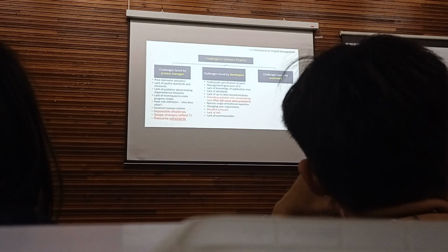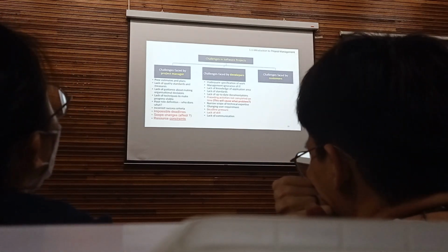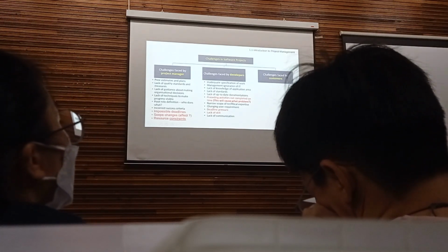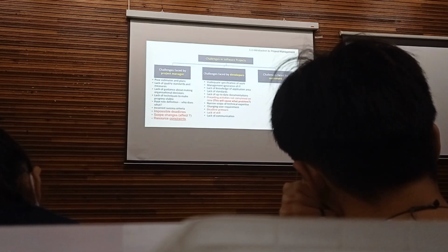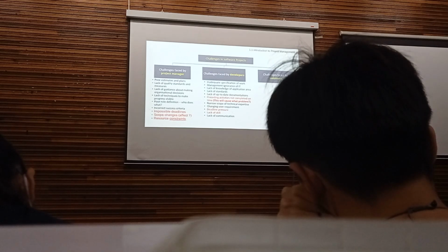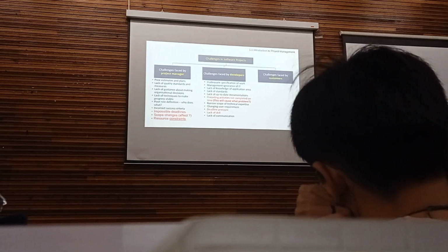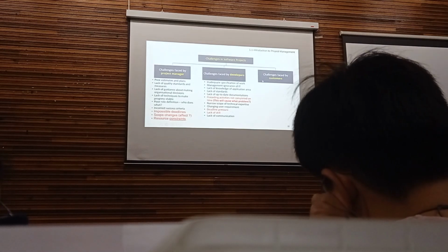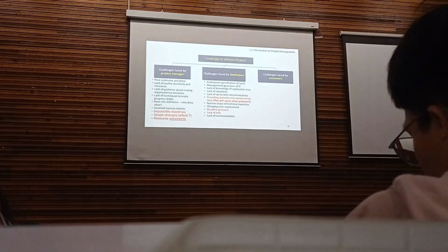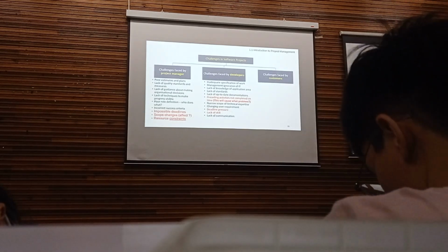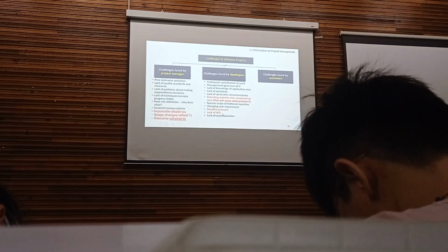Alright? So preceding activities, based on the example given there. The preceding activity is task 1. Task 1 was not completed on time. So this caused Jim to have to rush, because he has less time to do task 2. Deadline pressure. So the project manager has deadline pressure. Developers also have deadline pressure. And lack of skill.